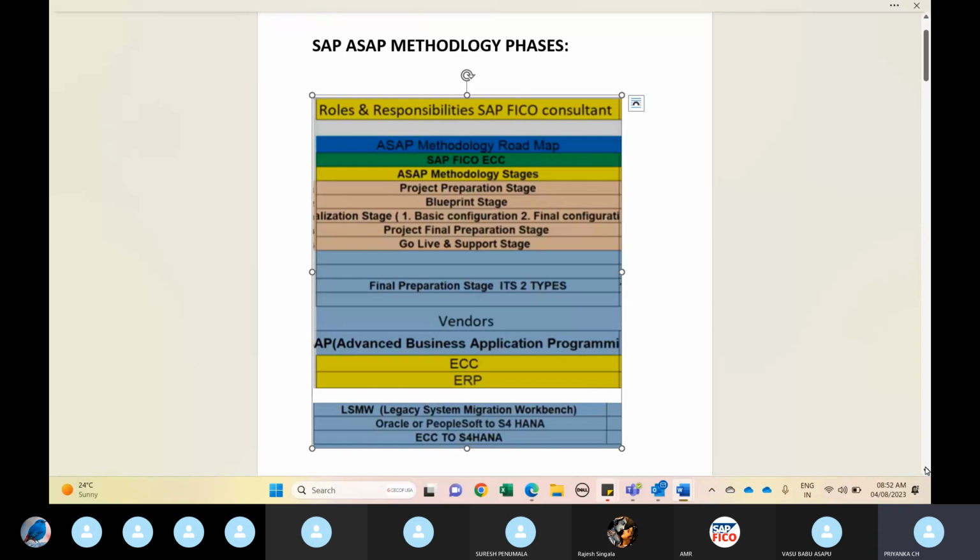For example, the first one would be the scope analysis, the scope document. It is nothing but a predefined table. They would follow some predefined tables or a questionnaire, like taking interviews with the functional people at the business level, the client level. They would also conduct a few workshops, and observe how exactly things are going on in the client business. So that is the scope document, where they usually follow the predefined tables and questionnaire and conduct interviews.